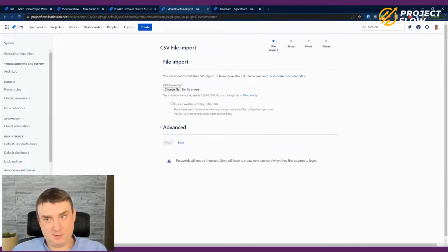And next one, when that works, take 2 or 3 tickets, go to this section and try to map them. And when you go into this last thing with the values, of course, the first one will be setup. Do it in the demo project. Yes, I know you can always delete tickets if you've got enough permissions. That's not the problem. But sometimes it can be an issue. So never import tickets to production, especially if you've never done it before. And when the dry run works absolutely fine, do it in production. So it's a pretty simple step.